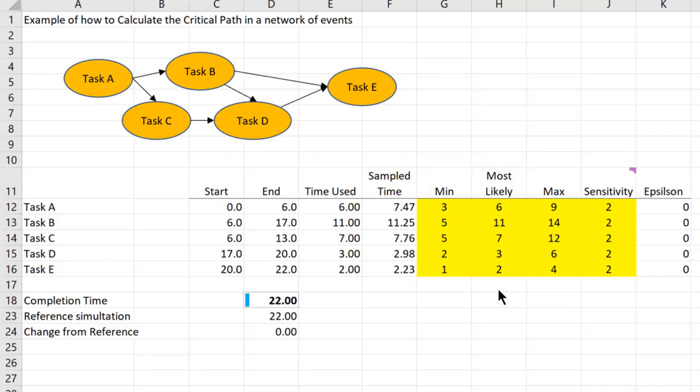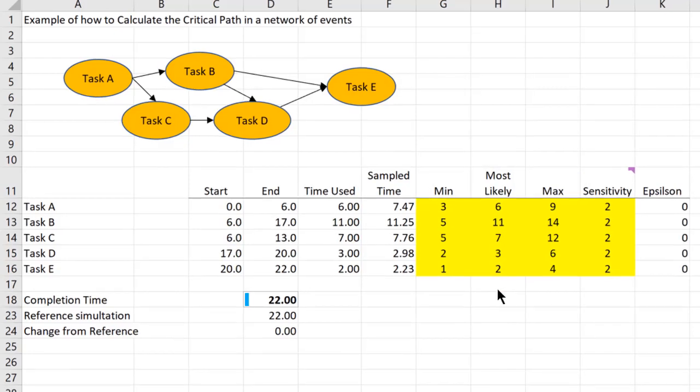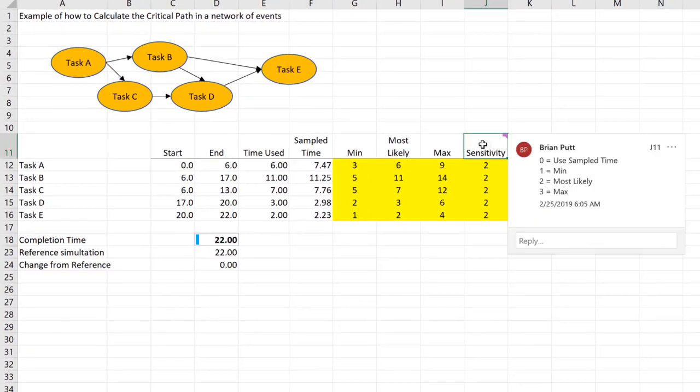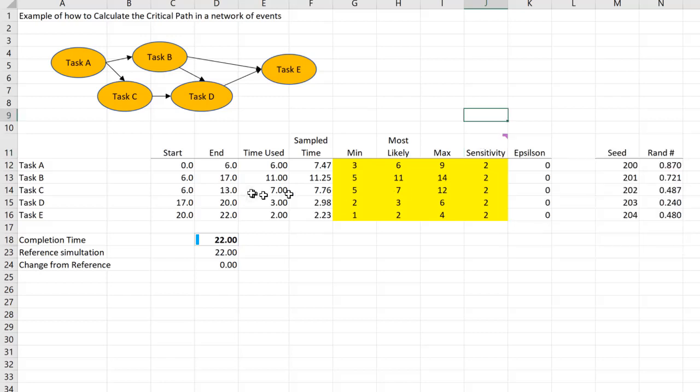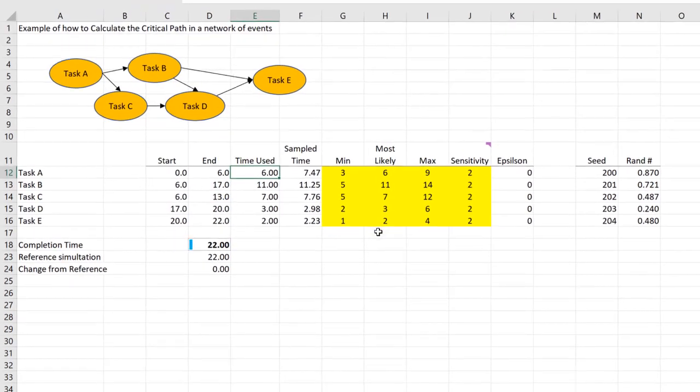Let's talk about the critical path when all the values are at their most likely. In this model I have a variable called sensitivity that can take on four different values. If it's zero it uses a sample time, one is mean, two is most likely, and three is max. As you can see I've set it to two, the most likely value.